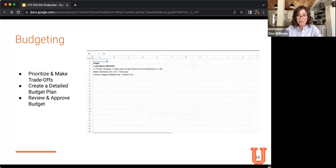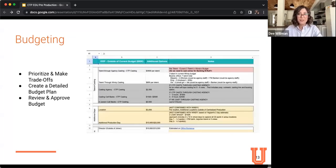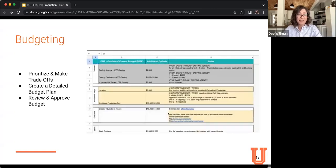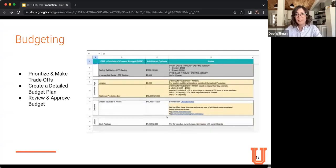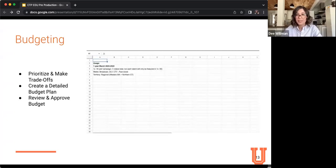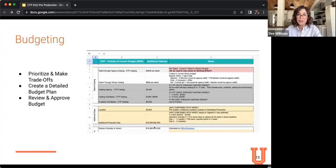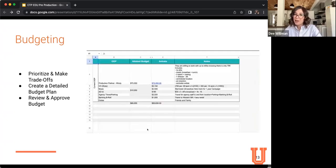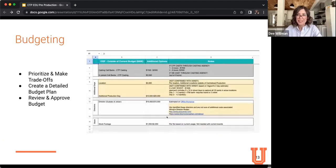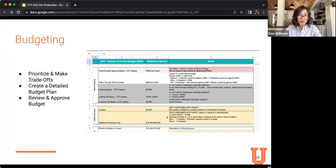to the campaign objectives, such as knowing that you need talent for on-camera roles, but consider that talent can be cheaper if they're not speaking, or you're not featuring their full faces, or just their mouths, like we did with the Delta Dental Express Your Health campaign, or if you're utilizing agency staff as talent rather than casting. Consider making those trade-offs by reducing costs in certain areas, like collaborating with your creative team to concept with one location in mind for 3 videos, rather than adding multiple set changes that could add days and add more cost.